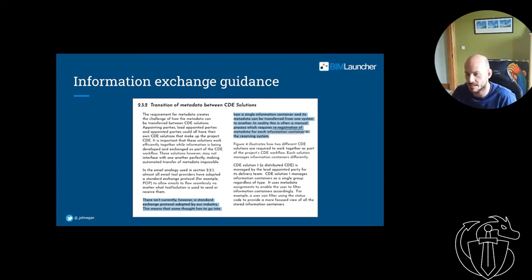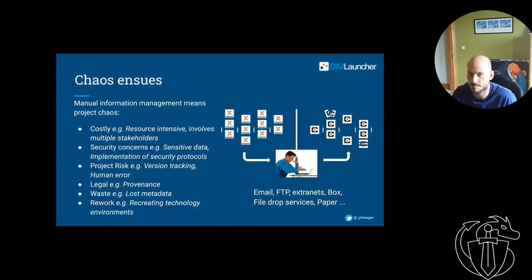This means that some thought has to go into how an information container and its metadata can be transferred from one system to another. The reality is that the metadata requires re-registration for each information container in the receiving system. So chaos ensues.